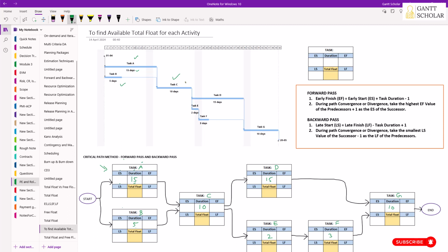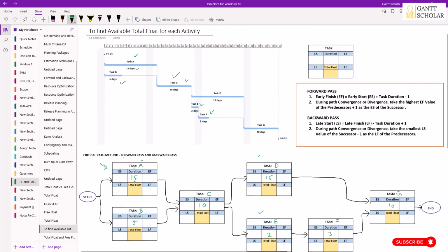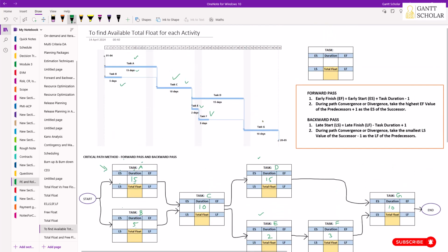And once you are done with activity C, we're going to begin activities D and E. And you have to finish activity E to begin activity F. You see here, we captured that dependency. And then to start activity G, we have to complete D and F. So we have captured the relationship as well.